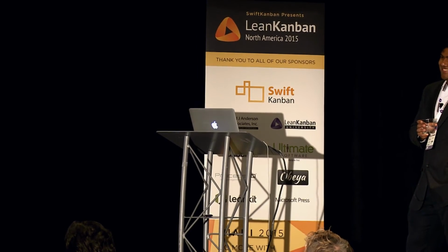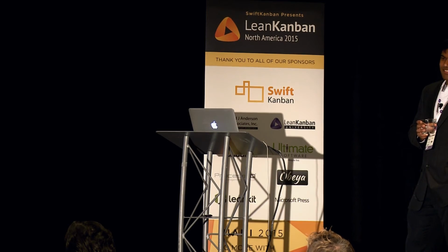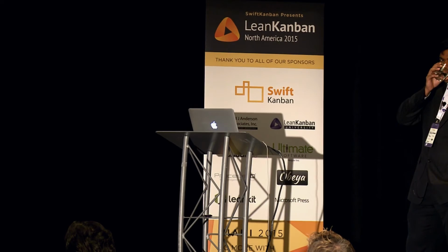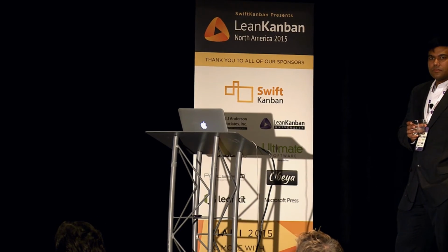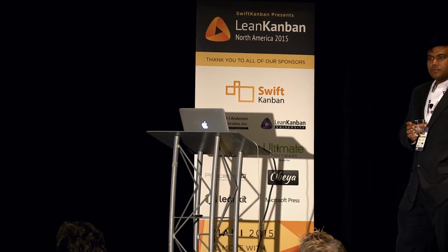Now on to the matter at hand. Over the past couple of sprints, most teams haven't finished all the stories in their sprint backlog. I've looked at the work, and these commitments aren't being completed because the stories are too large. Many can be sliced into smaller, more manageable batches. Do you have a specific example? Sure.